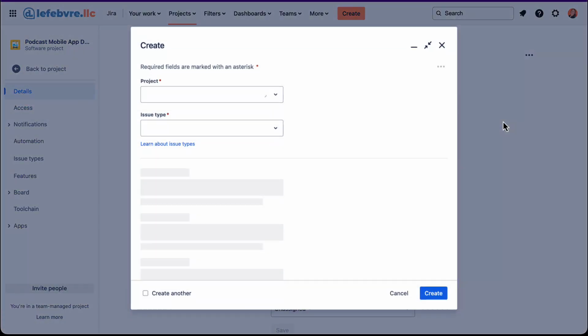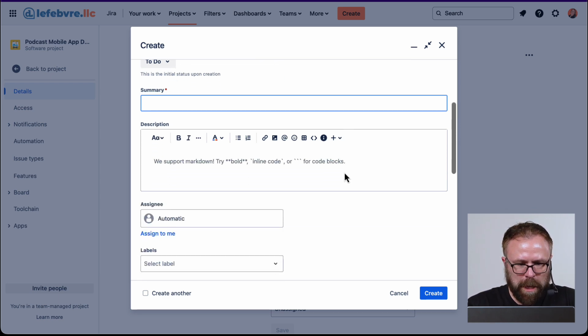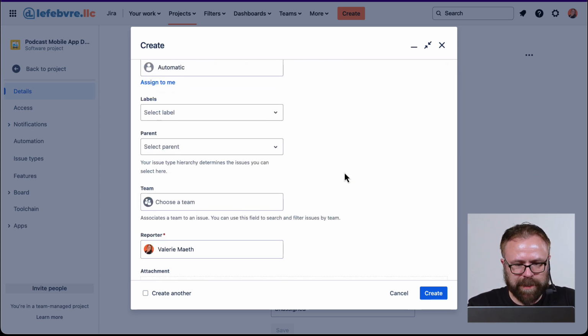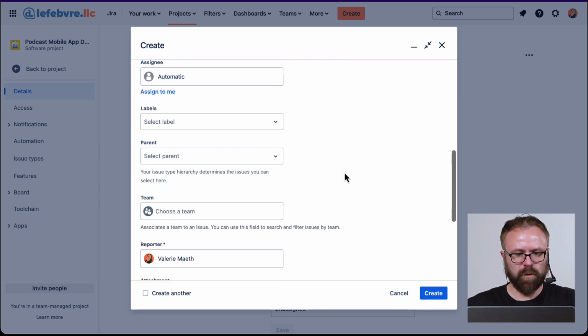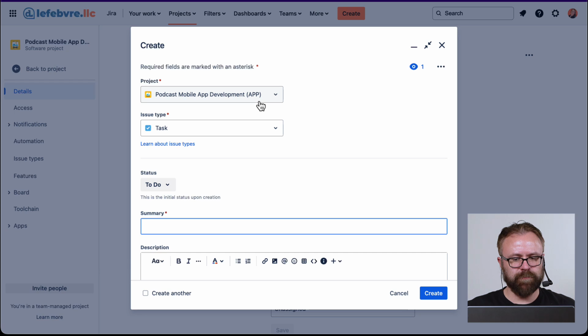Well, the basics of filling in information are straightforward. But let's understand some more of how this screen works and how it's laid out. So everything below this divider line are fields. The fields that you see in an issue are controlled by the two drop-downs above this divider line. And it's hierarchical, so it's top to bottom: the project and then the issue type. You change the project, that changes the issue types available within that project, and then the issue type that you select will control what fields you see below it.